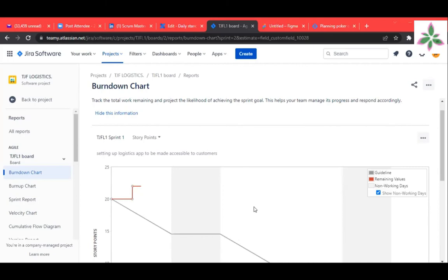Our average, I think from the last meeting, we had calculated that for 4 of you participating on the Jira board, each of you would have 8 story points, which is about 30 something, right? Yep. But notice that you did not pay attention to what each person's story point is when you were putting those stories, right? That's one. Two, your user stories that you put.